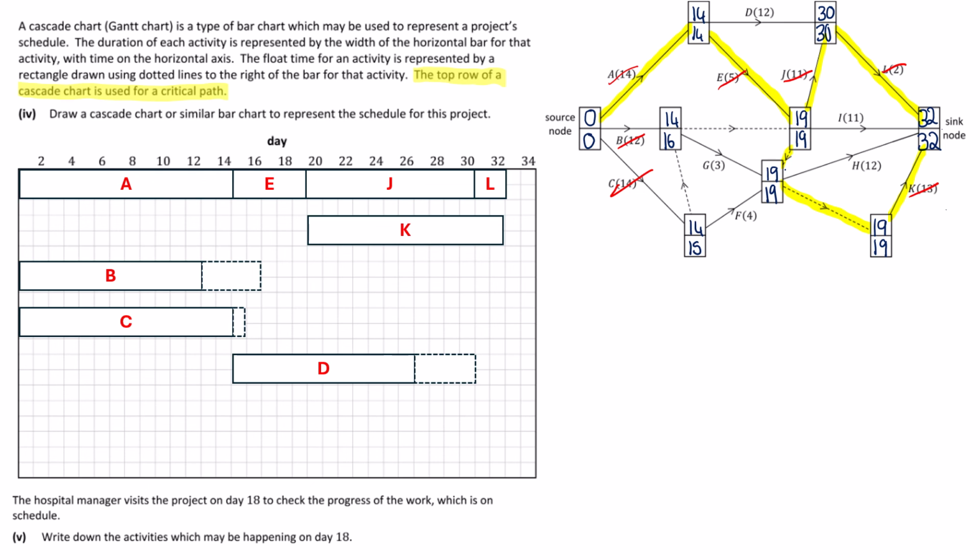Next we have E and F. F is starting here at 14. It goes on for 4 days, and then ends at 19. So there is a day's floating there. So 14, duration 4, and then we'll have 1 extra piece there.